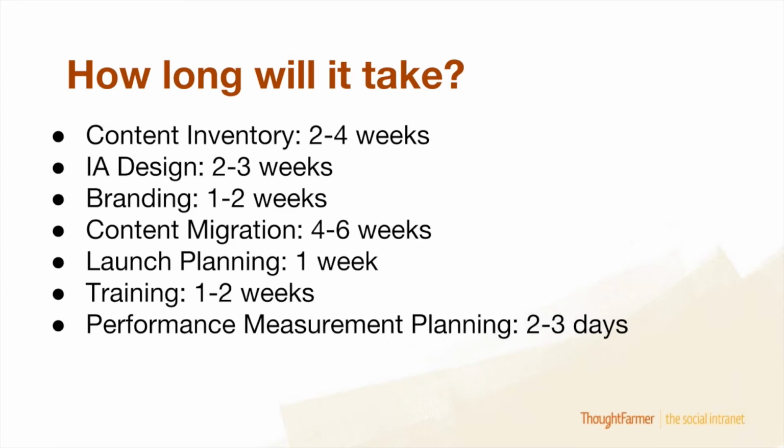The Big Bang approach is very powerful. If it's a company-wide launch, you can make it really festive, confetti can drop out of the ceiling, and you can organize a lot of events to create excitement around it. Perhaps sometimes a challenge with a pilot approach can be that you have only a few people on that intranet. What if they don't use it in the way that you had anticipated, and the excitement is dying off a little bit before you're ready to launch it to your entire staff? So that can be a bit of a risk there.